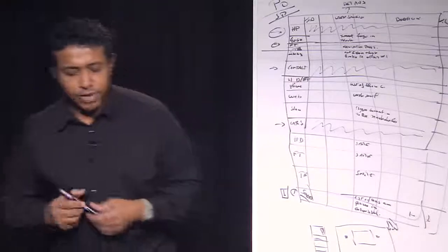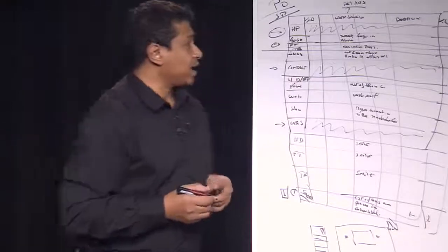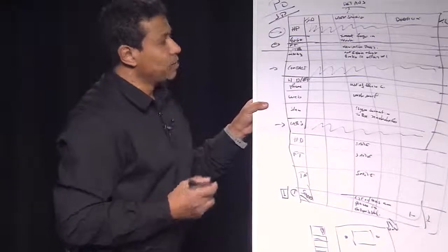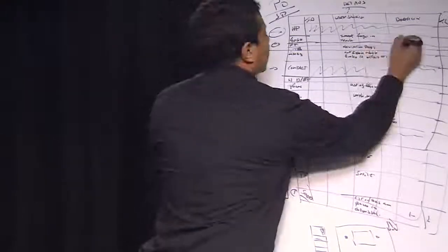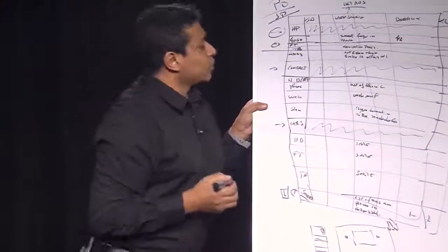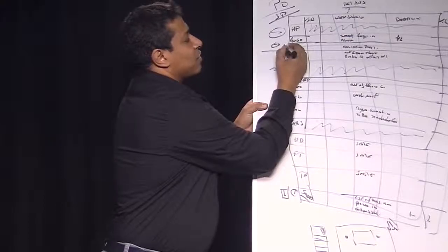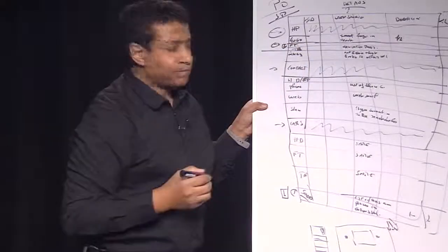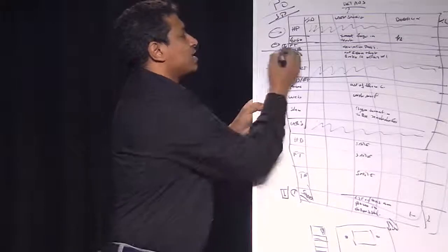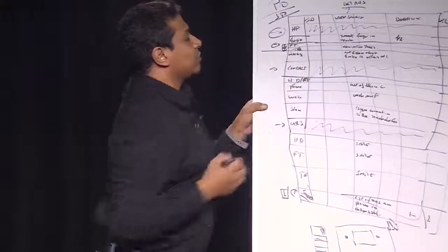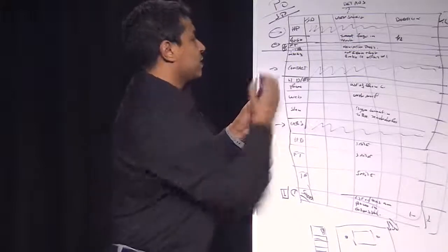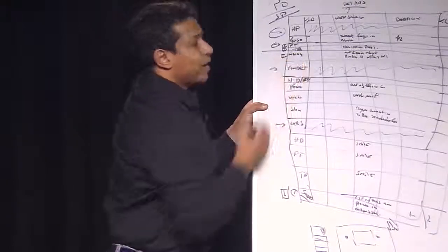So, okay, the Scrum Master says, okay, fine, I will do this. I've got the HP, put the logo, let's say half an hour. Footer, not precise enough. What's on the footer? Toolbar, navigation bar, not precise enough. What's in the toolbar? What functionality? Links, not precise enough. What are the links?